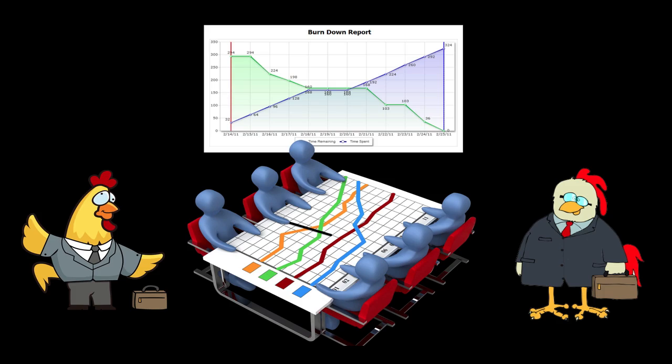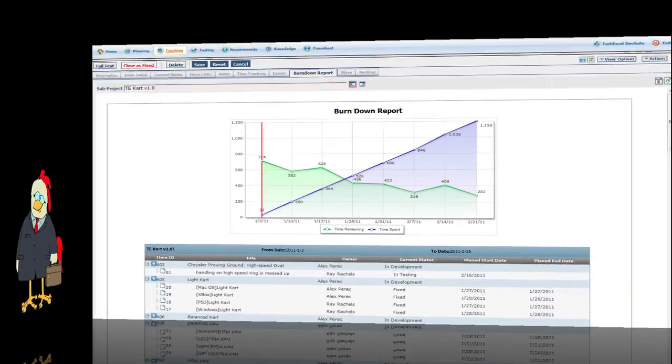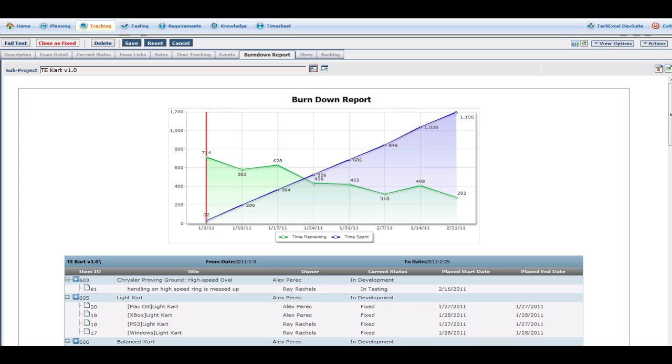A release burndown differs mainly in scope. Since with many products it will take multiple iterations to complete a release, a release burndown tracks overall velocity as progress is made towards a release. With a release burndown, we track story estimates and are more concerned with the average velocity over multiple sprints as opposed to the velocity of individual sprints.